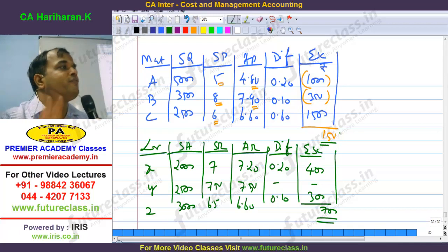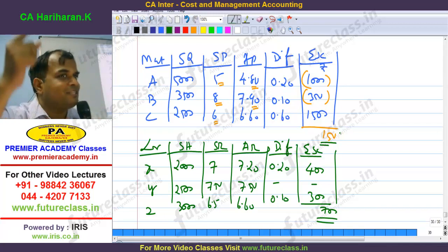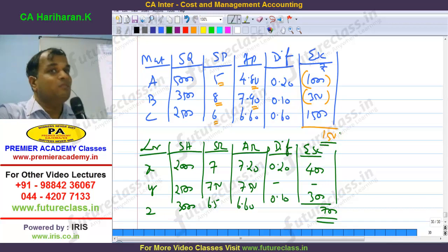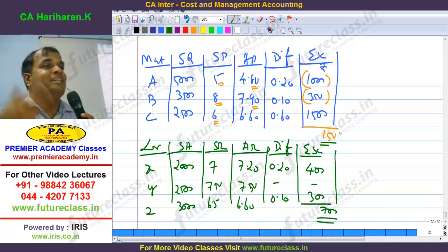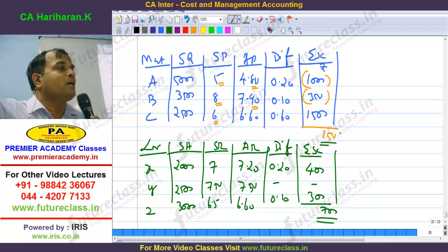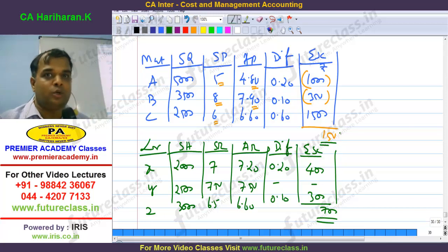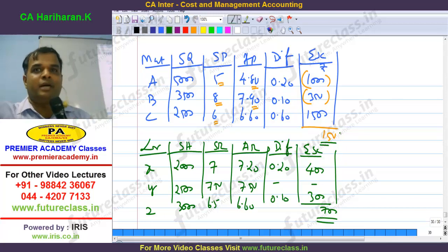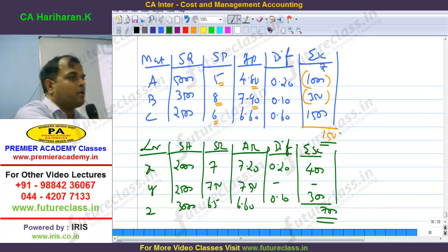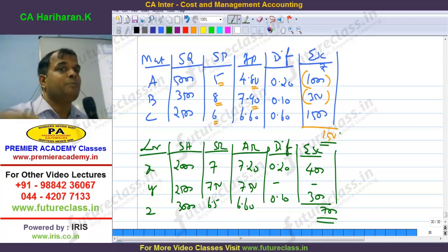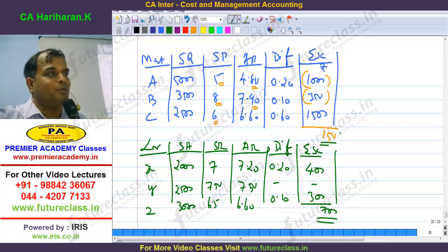So quantity difference will not come. Escalation is with respect to money. Why? Quantity difference is within my control as a contractor, I can cheapen it. Whereas price difference is due to what? Government policy. Like petrol price going up. Clear? Sand rate, cement rate increase. It's beyond our control. Anyone can see it transparently. Gold rate, anyone can check now. Clear? Increase or decrease you can verify. Therefore trustworthiness will be there with respect to price. Quantity is not possible to verify.